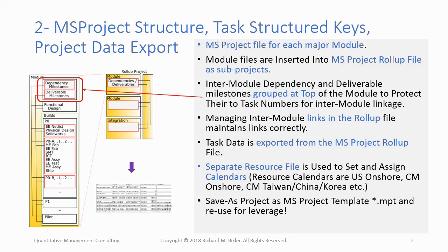Similarly, each deliverable from a GANTT plan in an MS Project MPP file that's deliverable to a task in a GANTT plan contained in a different MPP file should be represented by a milestone of duration 0 in the deliverables section at the top of the MPP file. That milestone task should be linked as a successor to the task within a GANTT plan contained within that MPP file that completes production of the deliverable.